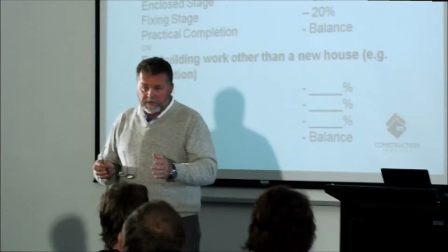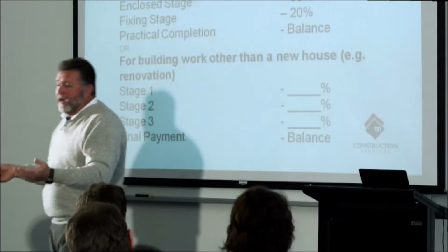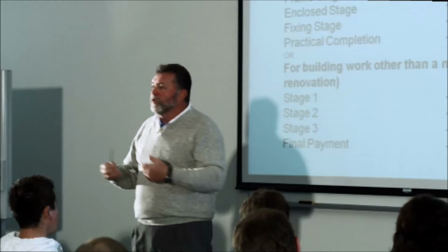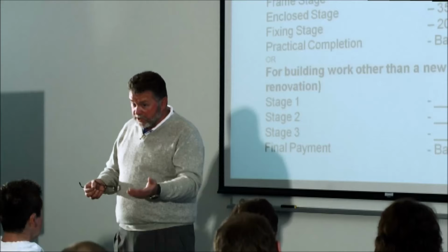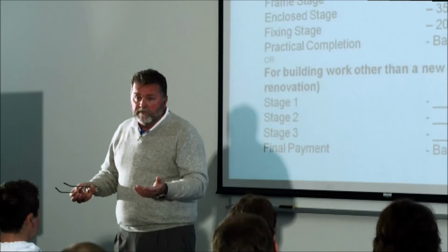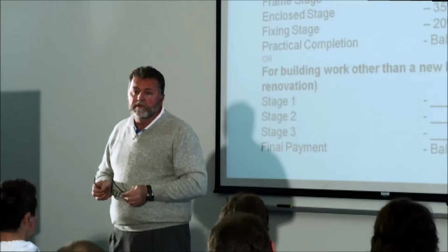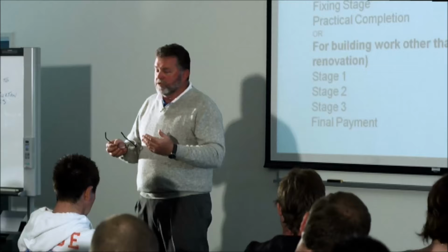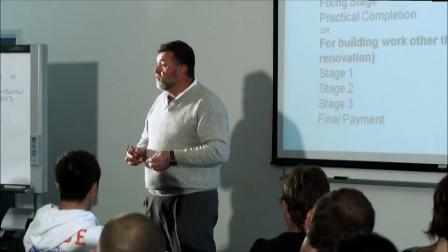The trouble is that you are all such big-hearted people that you believe you should be doing everything for the owner. Remember what I said earlier in relation to development applications, which a house removal is, by the way. It requires a development application. That's not your problem. Your problem is to give them a product when they finally give you something to work with. The question was, if you came to the job and found something wrong on the site, then yes, you would need to do a variation with the owner for that extra work, because your scope of work has now changed. Remember what I said?